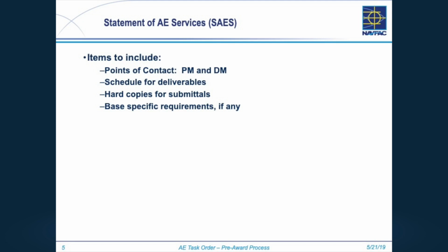One thing to point out to you is our standard template says we want 6 hard copies of everything for every submittal. And you may not want to shred all that yourself when you get all this stuff. So pay attention if you need any hard copies. For some of the interim submittals, maybe we want 1 copy of just the plans in case you have to make a presentation or talk to somebody about it. That's a big thing that you need to make sure you edit as you're doing your statement of work and think about.